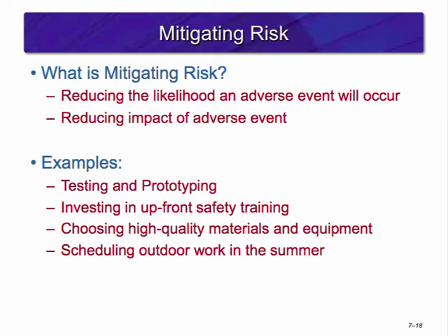Testing and prototyping are frequently used to prevent problems from surfacing later in a project. By testing smaller sections before putting them all together, you can identify problems before they become large. Software companies will often do this. They will run tests on small, incremental pieces before checking them into the larger system. If the smaller piece has problems, it's easier to isolate and resolve it there.